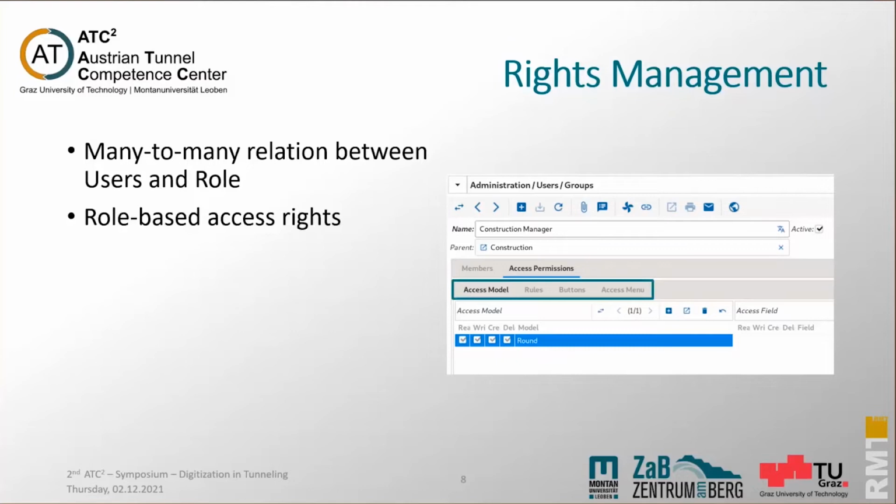The access rights you get on the software are dependent on the role one user has at the construction site. In our prototype we defined 4 different groups: the administrator, the site manager or site engineer, the foreman, who basically uses the thin client, and the client, which is normally represented by the site supervisor.